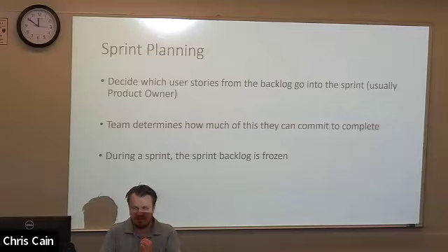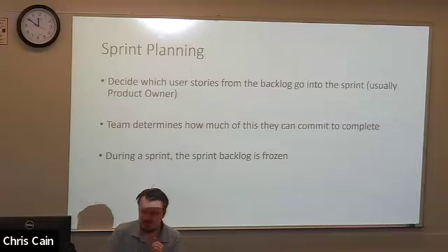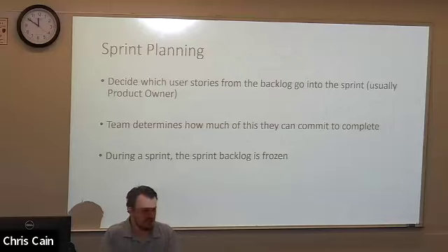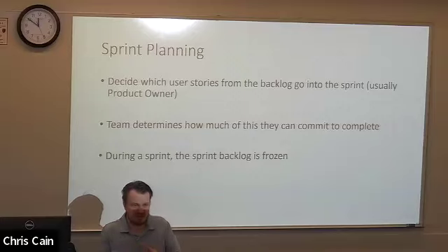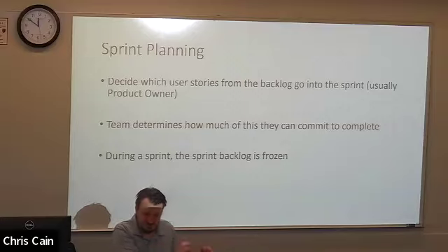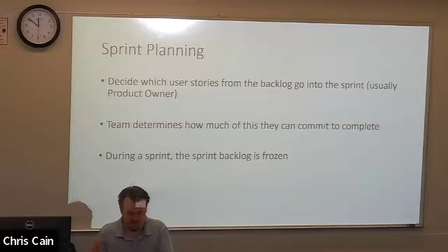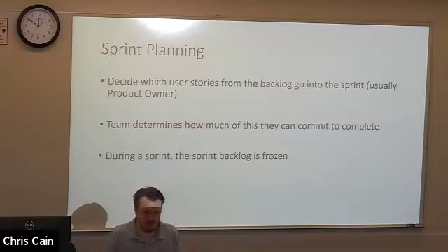Sprint planning, you should be doing this ahead of Wednesday so that you can make Wednesday as productive as possible. You should have tasks and roles assigned to people, but make sure that you're actually going through the user stories, converting those to scenarios, converting those to tasks, putting those tasks up so that people can check out those tasks from GitHub. I will be looking at that as part of the grade for the first sprint: are you using your issue tracker? That's called the Kanban board on the grading rubric. So make sure that you are using that.